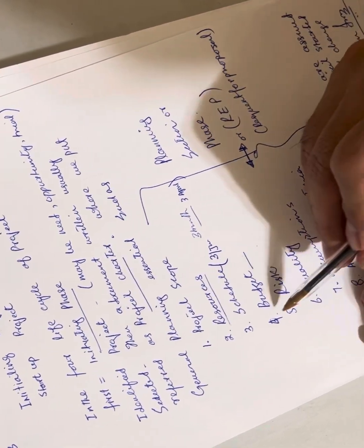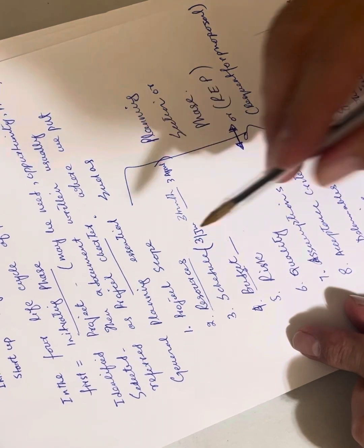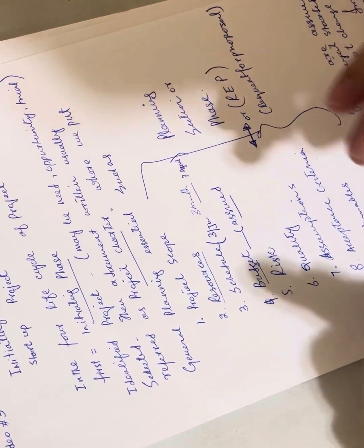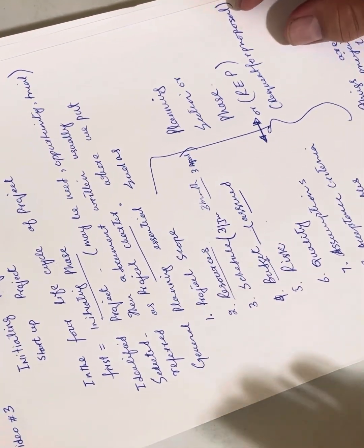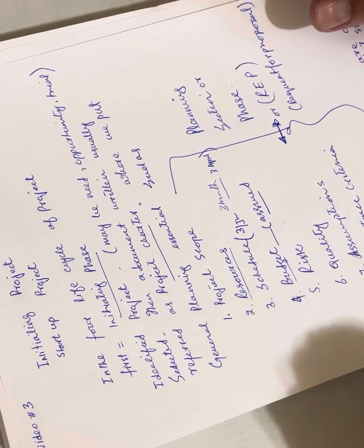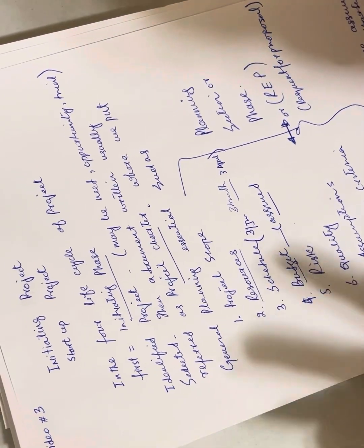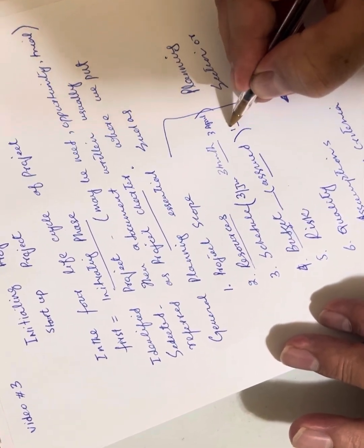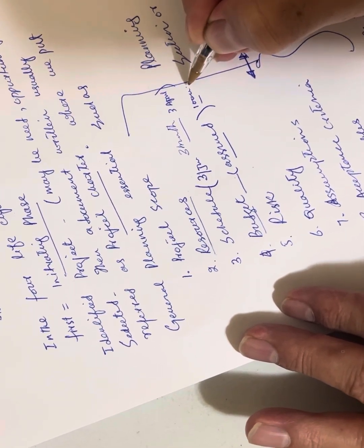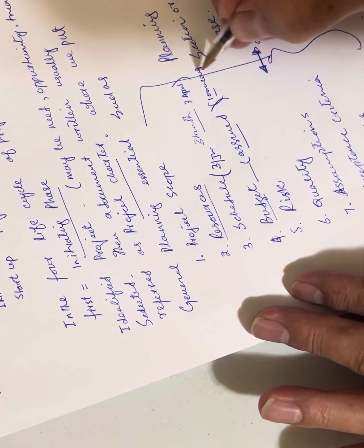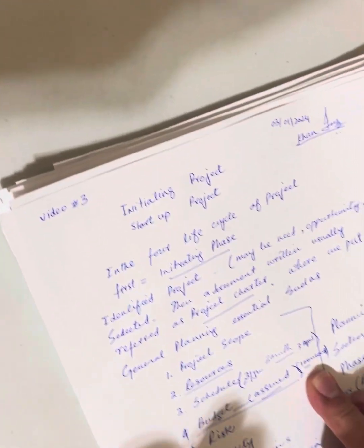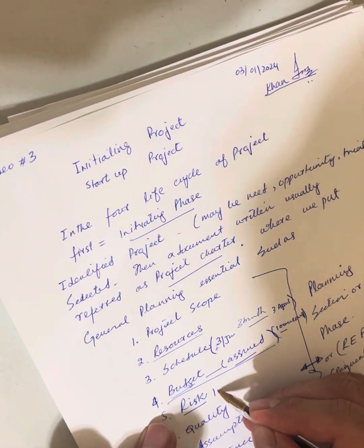And then the fourth one we put in the project charter is the budget. It's something we assume, like some material price, some equipment price, the time and the people, the salary. But it's a general idea of the budget. You put approximately, let's say, 1 million Canadian dollars. And then this budget we prepare according to this duration and resources. So the fourth one is the budget, and the fifth one is the risks identified.